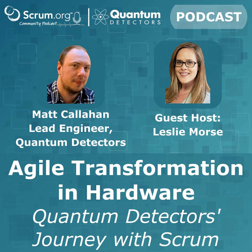Scrum for the sake of your own gratification versus Scrum to really drive the learning and empiricism that it's there to serve. Exactly. And I think empiricism is a key word for us, because things are expensive in hardware. People don't want to make things that often. So one thing we found really valuable, with empiricism in mind, is that if you don't know which design choice to make, can we make a prototype? Can we physically make something and validate it one way or the other? Or can we simulate something to prove it right or wrong? Getting further down the truth curve as quickly as you can, it sounds like.